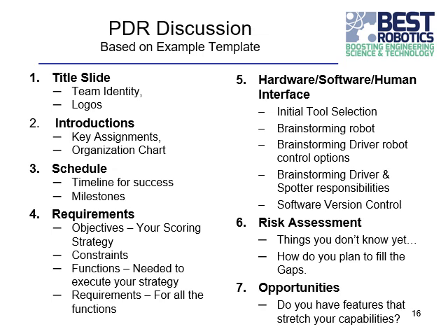Then a schedule. 8 weeks is going to go by really quickly. You need that PDR at about 2 weeks, CDR at 5. You've got a practice day in there. You've got to get engineering notebooks created at week 6. And how are you going to lay all that out? Have a general idea of what you're going to have done when.